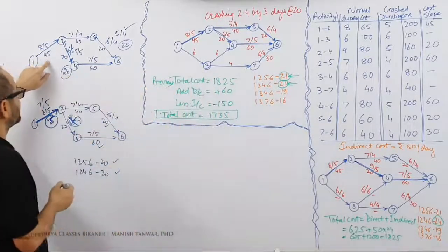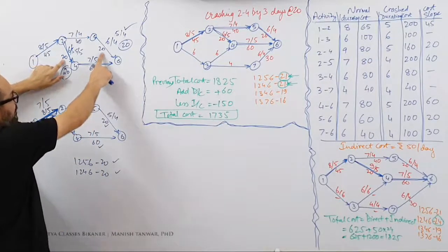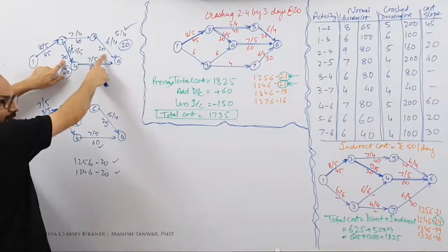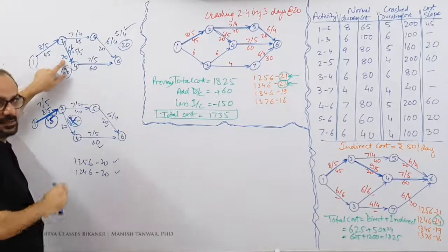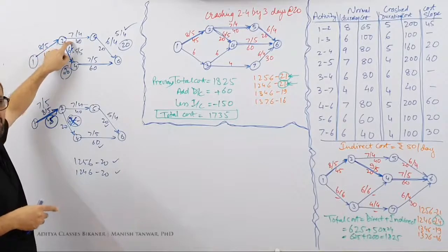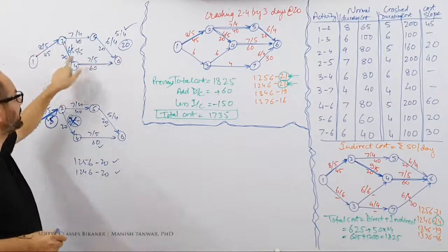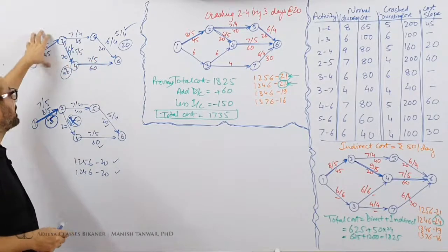Earlier also I had a choice, but earlier this was costing me 45, while separate payments were costing me only 20 plus 20, 40 rupees. That's why I made a payment of 40 rupees. But yes, both days could not be saved here. There was a saving of only 1 day. So what I did, I at least saved 1 day at 40 rupees, 28 plus 20, and I'll save 1 day at 45.